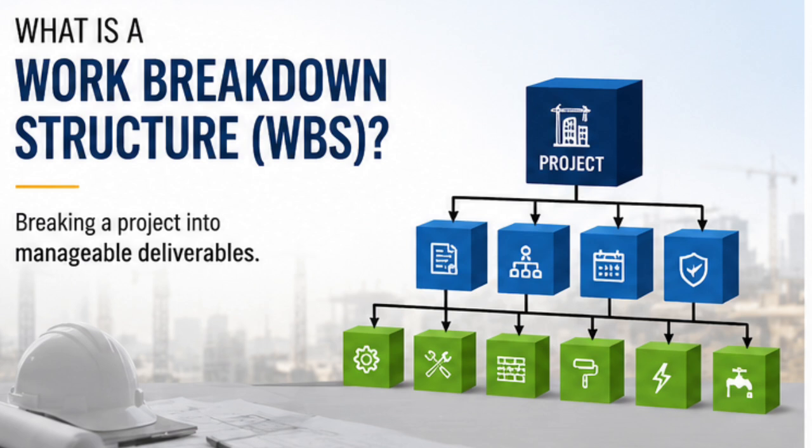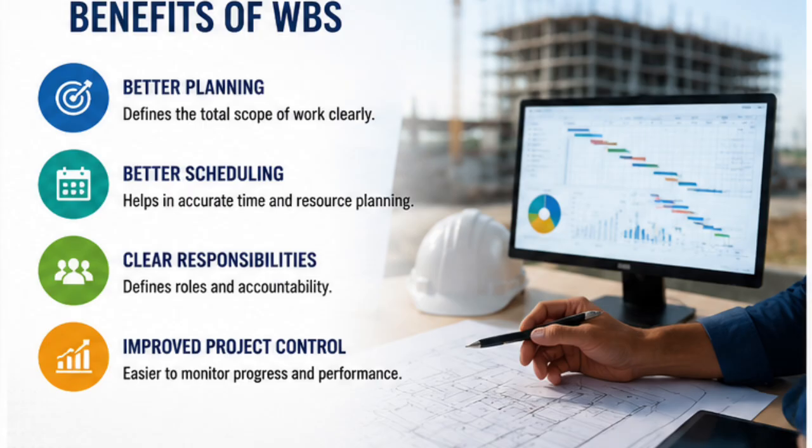You may also need to start the design activity, so you can have a design start, or a contract award, coming in the contractual milestones. Then you can further add construction start and construction finish, then commissioning and handing over of individual areas or units. This also comes under the contractual milestones.